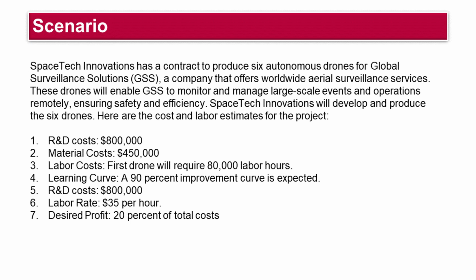Here are the cost and labor estimates for the project. R&D costs, $800,000. Material costs, $450,000. Labor costs, first drone will require 80,000 labor hours. Learning curve, a 90% improvement curve is expected. Labor rate, $35 per hour. Desired profit, 20% of total costs.